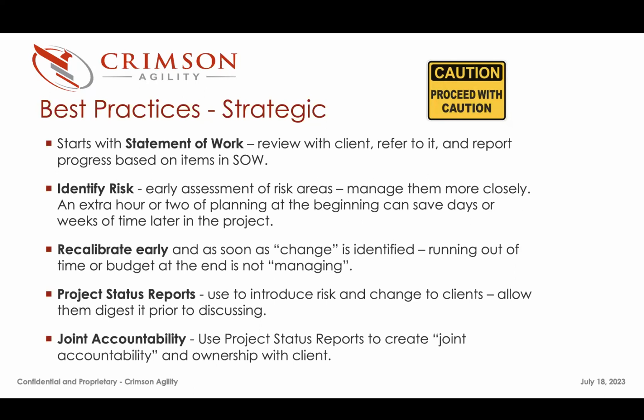Project status reports are no more than a tool to manage accountability, manage change, and demonstrate progress. It's a formal communication tool, and I always say it creates joint accountability. It creates ownership that the client has to adhere to, right? If you have project status reports throughout the project, you can go back and point to things you've communicated or highlighted, that they agreed to and signed off on early in the project, that might come up at the end of the project. So doing those about every 3 weeks creates the right rhythm in terms of accountability and helps to manage expectations and change.